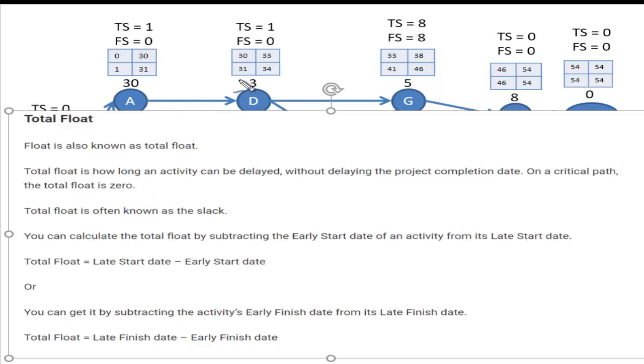Okay. And when we try to find the critical path, wherein I will try to find the critical nodes, the total slack should be 0. That is, I should not be delaying my activity. So where there is a 0, that means I'm not delaying anything. I will choose that only as my critical path. We'll see that shortly. It's also called total slack, like I told you.